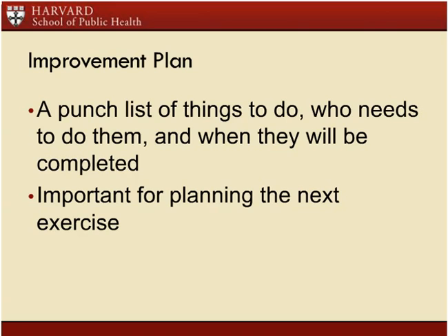Instead, exercises result in after-action reports that name specific plans and an improvement plan that identifies who's responsible and when those problems will be fixed, so that after each exercise, ideally, concrete and measurable improvements are made, and overall the preparedness system gets better.